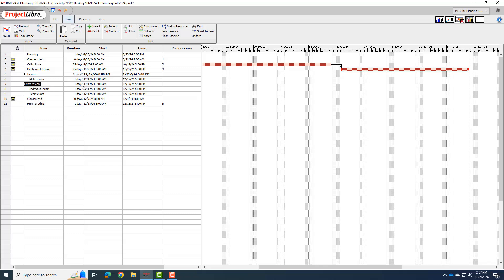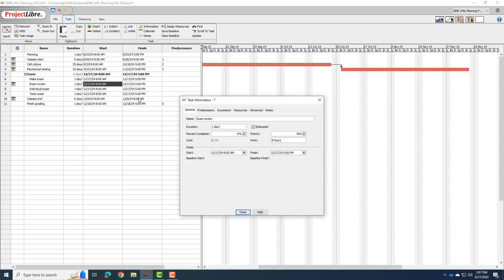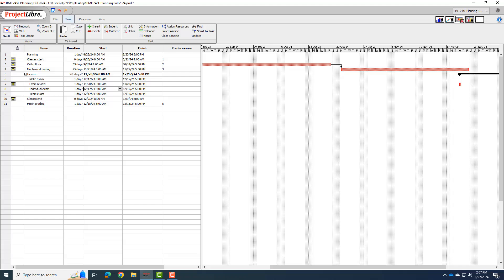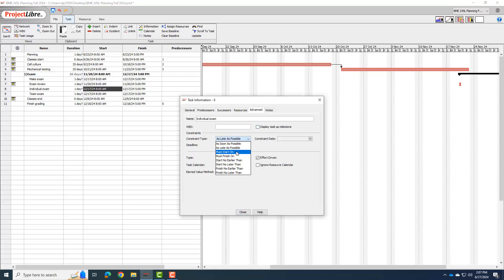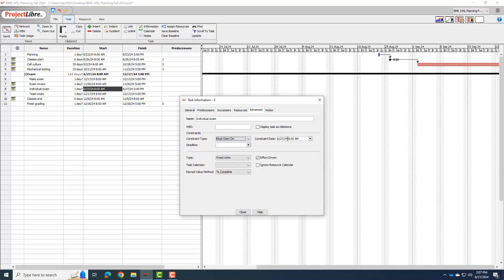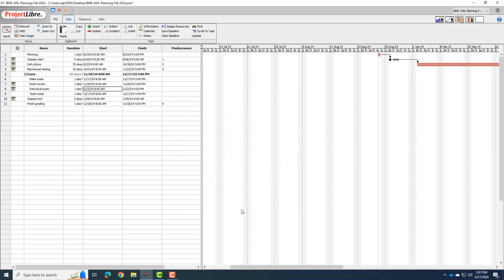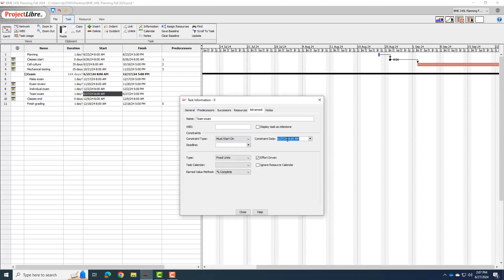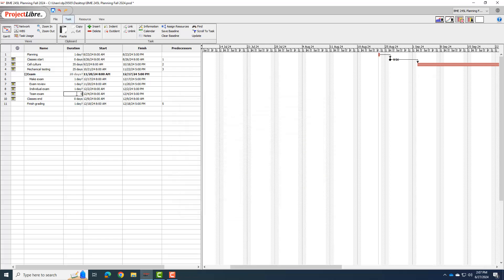The last three of these are actually milestones because they are happening in class on certain days. So I'm going to set those milestones. The exam review is 11-20-2024. Again, it didn't let me do that, so I'm going to go to advanced. Must start on 11-20-2024. And the individual exam must start on 12-2-2024. And the team exam must start on 12-4-2024. These are all milestones, so I'm setting them to zero-day duration to make them milestones.